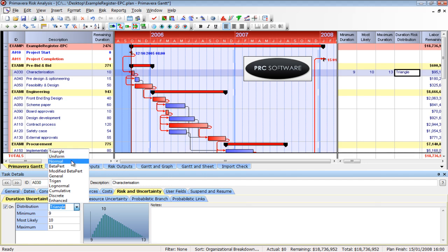You'll notice if I click on triangular and then beta PERT, people fight oftentimes about which one is more correct and what have you. And if you look at the actual sampling shape to my right, it's pretty similar. It's not going to give you that big a difference in the answer. There are reasons to use these other curves. If you don't have a statistical reason that you're using one, we normally say people are rigging the curve.